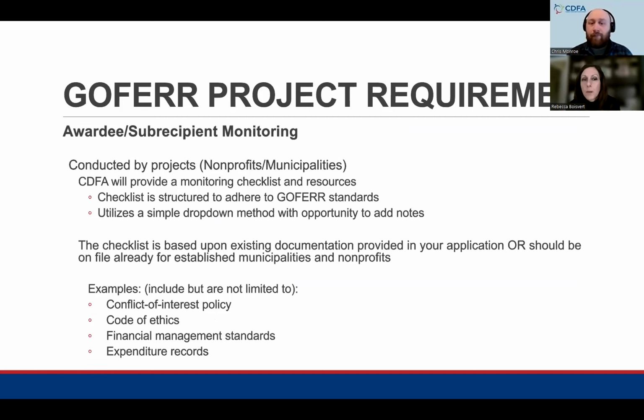We just had a question about if projects will have an opportunity to update their implementation schedule. Yes, absolutely. So that can either be done in the status reports, or that can be filed as a correspondence if it's not during the status report timeline. So if you are experiencing any delays, or if you're ahead of schedule or just on task, if you'd like to add components, preferably with the implementation schedules, they're as detailed as reasonably possible.